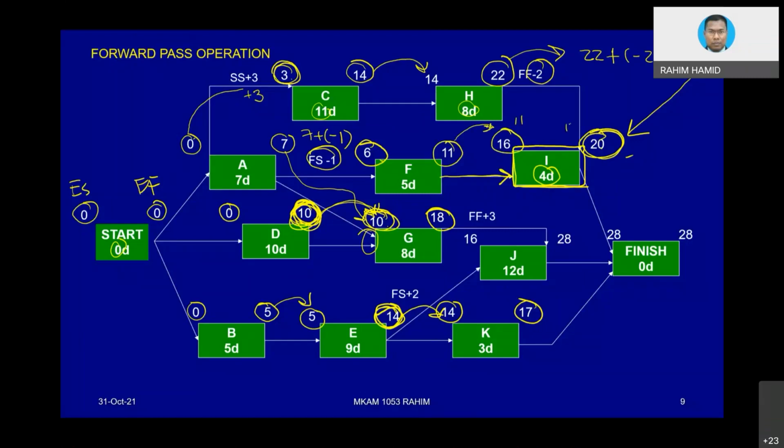So you see, between this number, which one is bigger that we input here? For sure, we choose the bigger value. So in scheduling, when we do have multiple relationships like this, from this relationship, we know which relationship is much more dominant.